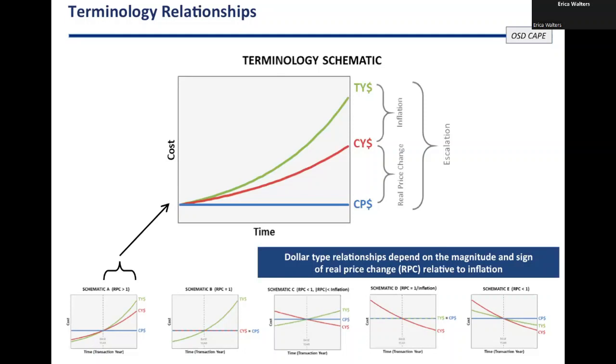And so what you've done in this calculation is use an escalation index to forecast into the future, and then an inflation index to get down to constant year. And people make those statements without saying specifically constant year or constant price or even real dollars necessarily, because they're just trying to conceptually convey something to you.